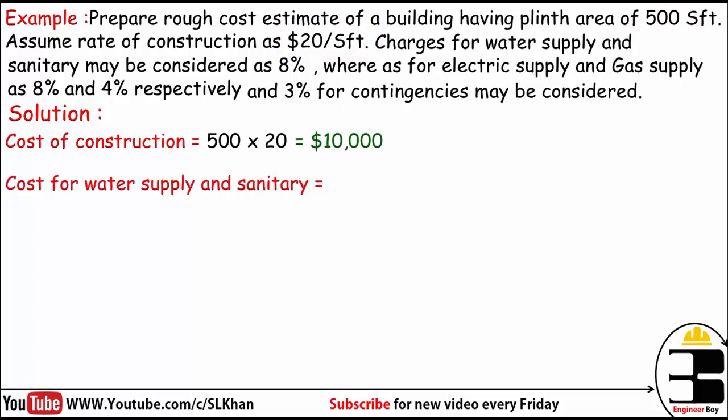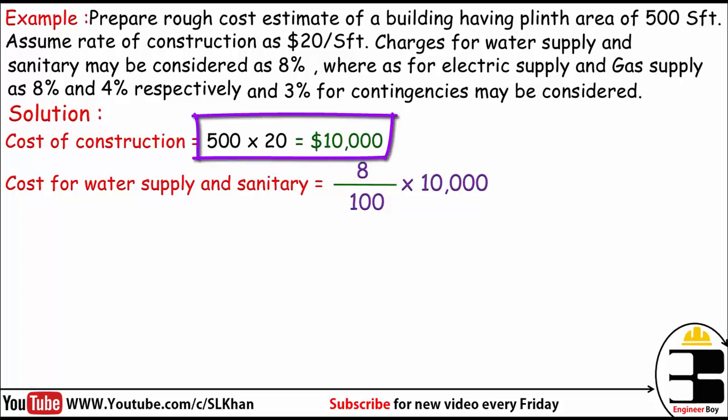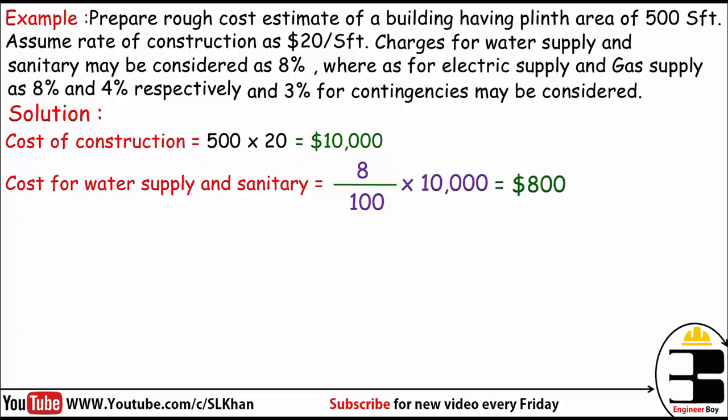The cost for water supply and sanitary is 8%. To remove the percent sign, we divide by 100. So if it is 8 in 100, then how much should it be in $10,000, which is the total cost of construction? We get $800 for the cost of water supply and sanitary.